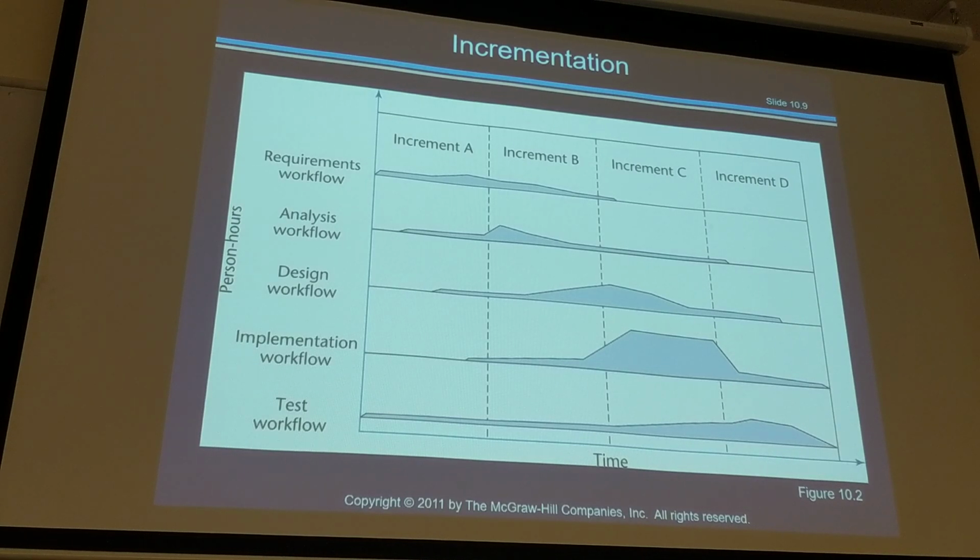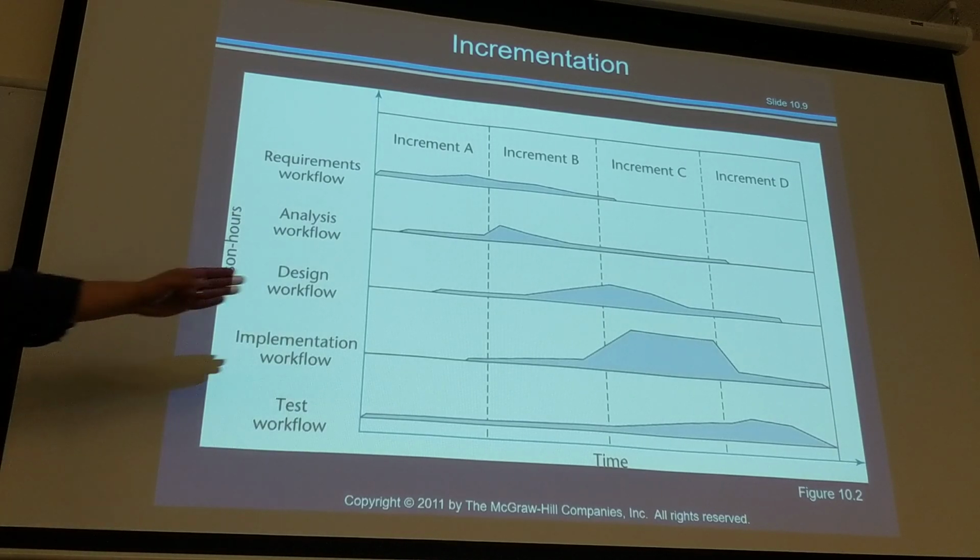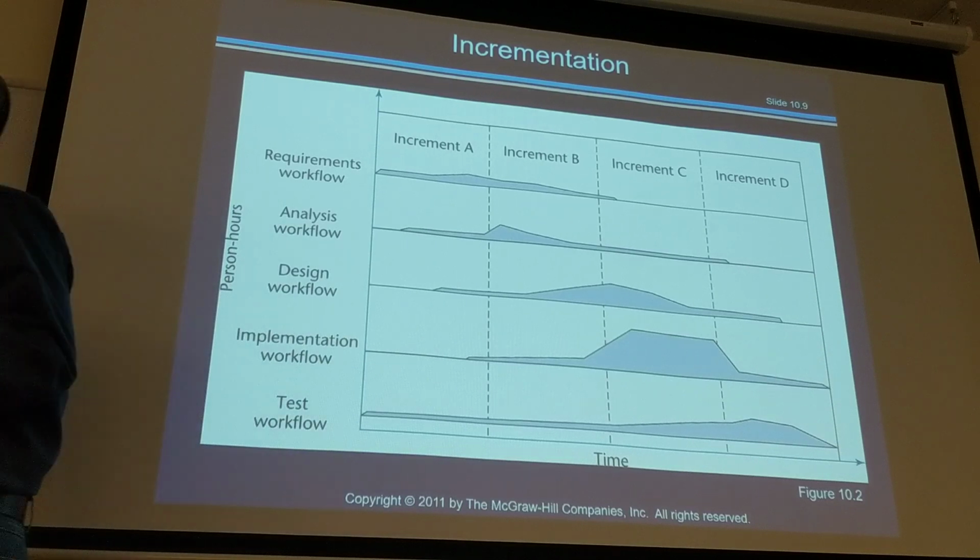Typically, right now, to measure this is going to be in the feature point. It can be in a straightforward way: I could use, in a simple way, say, what's your estimate for hours? Okay? Not even days, really work hours. How many hours you need to finish this particular feature, this code. So then, at the beginning, we'll be way off, right? Because we are not experienced with each other, and we don't have experience on the project. And gradually, in a later sprint, we'll have much better measurement of time.